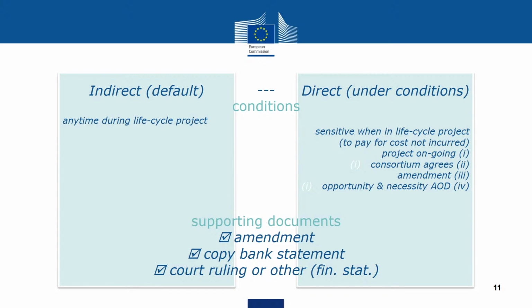agree to proceed with the action as it was intended at the beginning, at the time of the signature. And then, to make it slightly clearer what the idea behind the direct intervention is: very often it is used when you are very much at the beginning of your project, when you as coordinator have just redistributed all the pre-financing you've received, and a little while later one of the partners informs you that they are going into a bankruptcy procedure. That is the moment when you need to terminate this partner from the consortium.